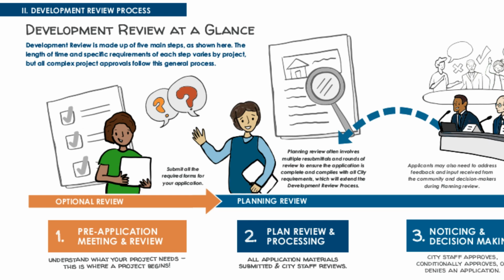Application Requirement Checklist. Required items for the Universal Planning Application. Project Description or Justification. Standard Plan Set. Site Plan. Existing Conditions Plan/Demolition Plan. Building Floor Plans. Building Elevations. Building Sections. Any other items as required by the Planning Department. The application submittal requirements vary from project to project depending on the scope of work, so it is important to confirm the items required for your specific project with a planner prior to submitting an application. Submitting an incomplete application may delay your project.